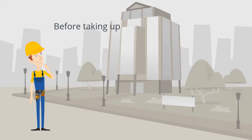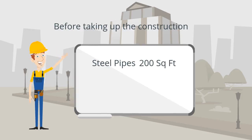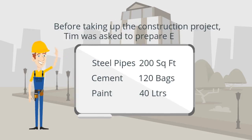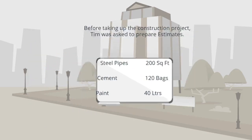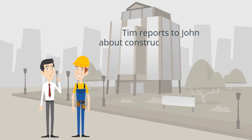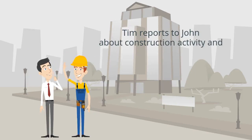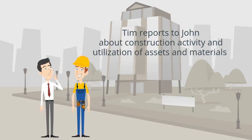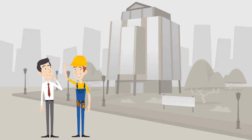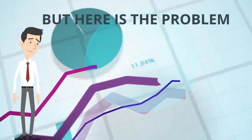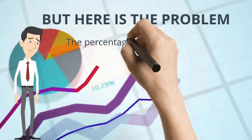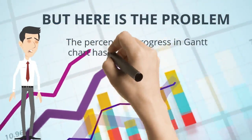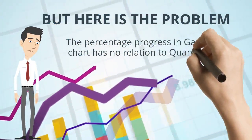Before taking up the construction project, Tim was asked to prepare estimates. Tim reports to John about construction activity and utilization of assets and materials. But here is the problem: the percentage progress in Gantt chart has no relation to quantity.